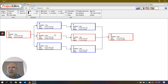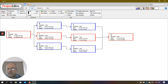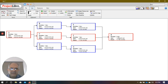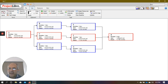The critical path A-C-F-H adds up as: 5 + 4 + 7 + 8 = 24 working days. Calendar days-wise it's longer — 24 plus the 8 weekend days we saw on the Gantt chart. I can switch back to Gantt view or the network diagram view using the respective buttons.